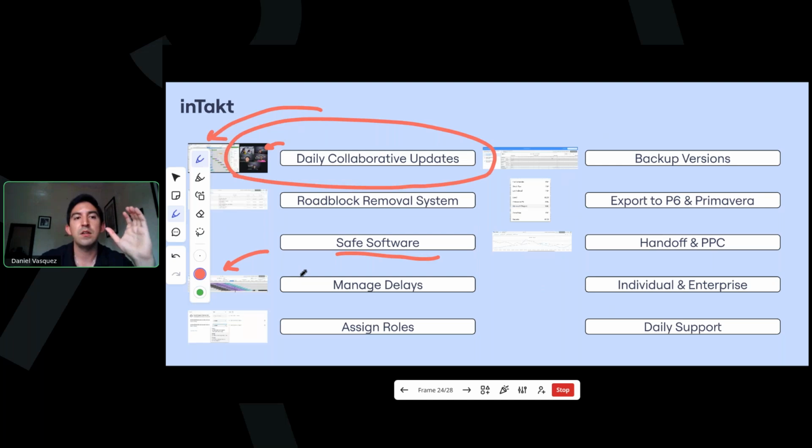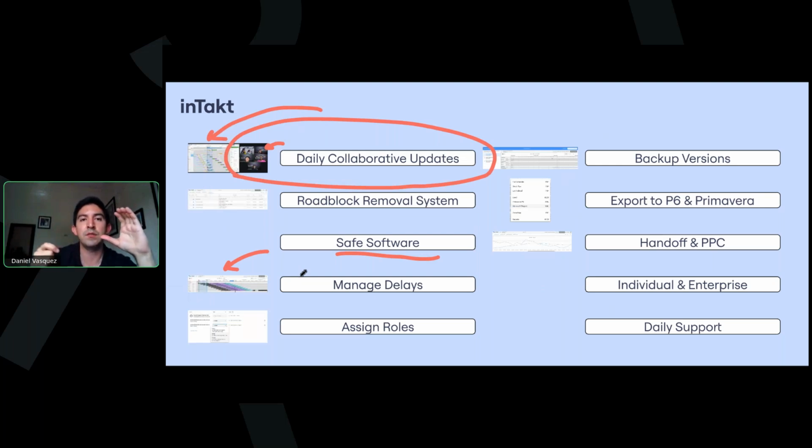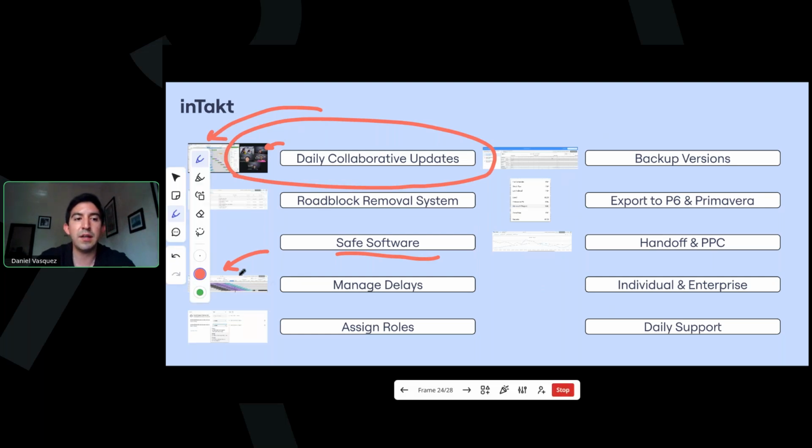And the difference with that is that it will show you the new deadline, automatically updated. So you don't have to only see the activities, but also see the relationship between each other. And this is possible because we are in a tact format, meaning we have the schedule on the top and the zones on the y-axis. That allows us to see the software like this.